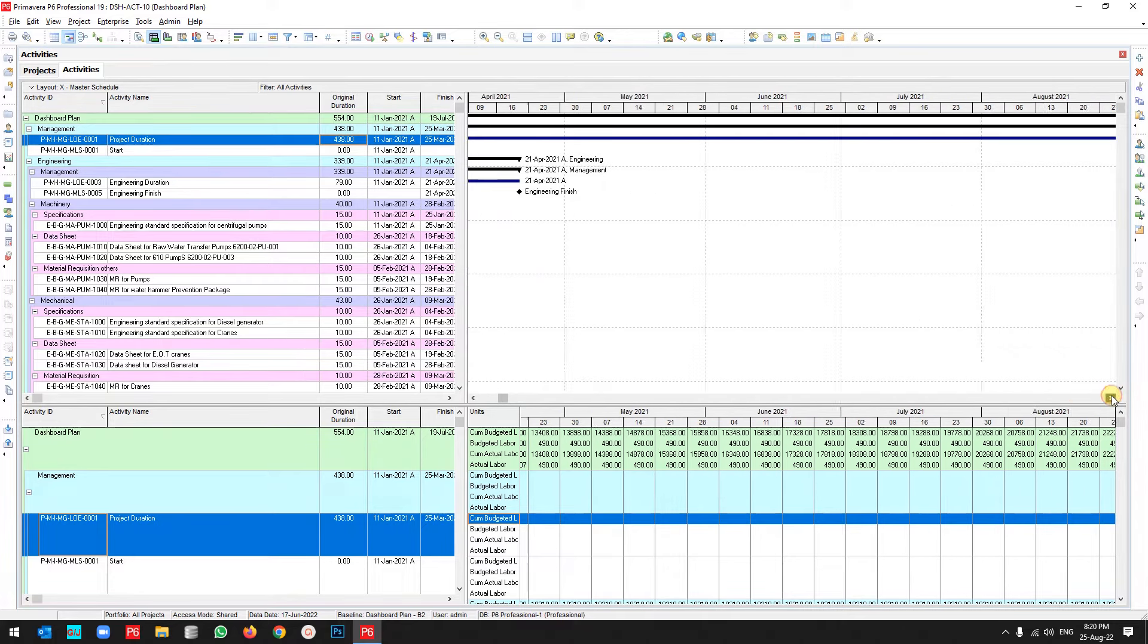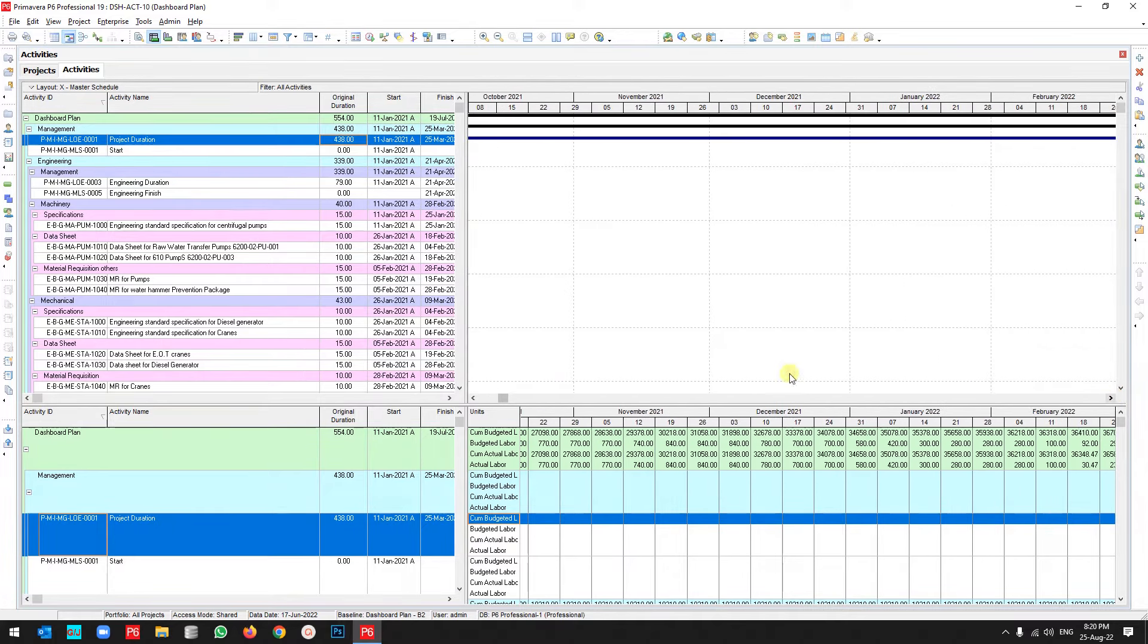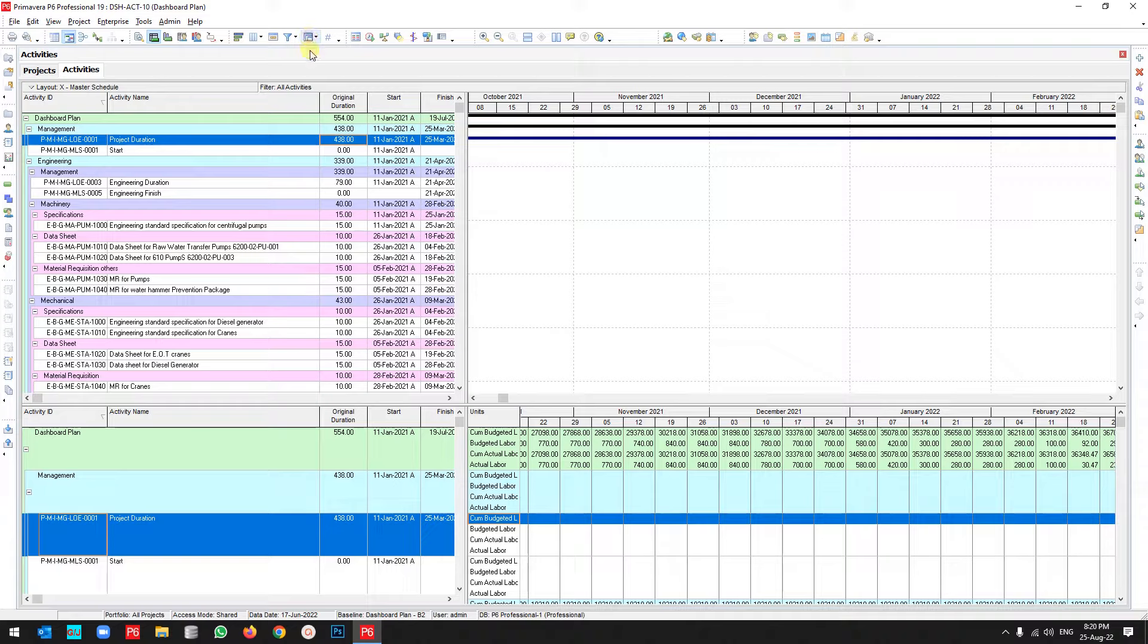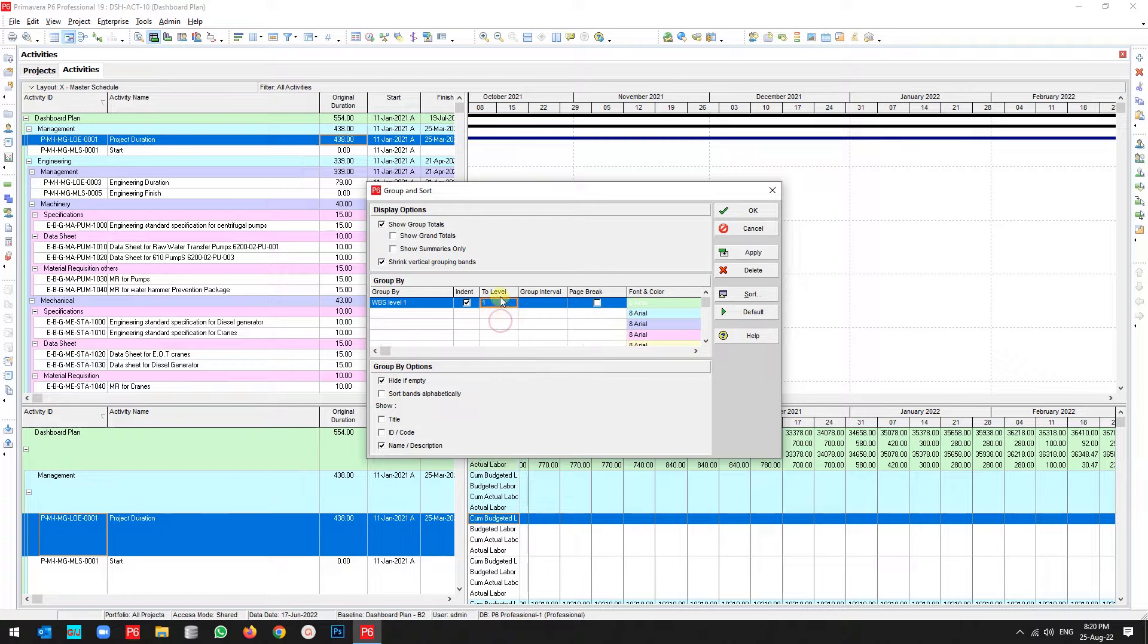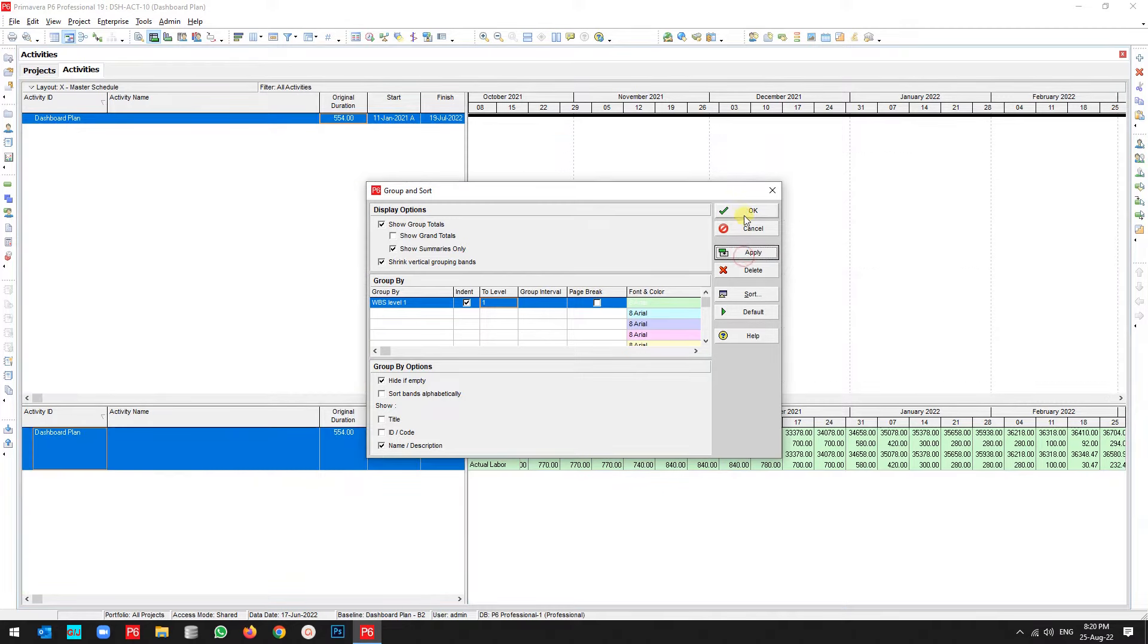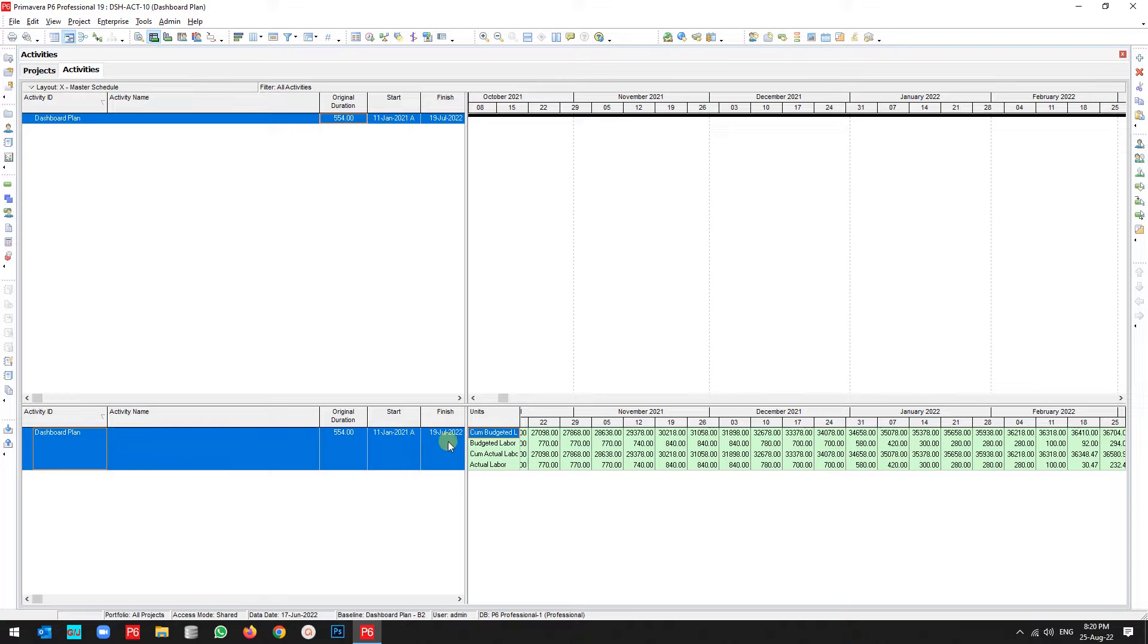But as you see, my project is a little bit big, so let me create this curve for some part of them. I go to the Group and Sort, then filter for all level, limit it to the first level, and show summarize only. Do not forget these two steps, then apply it. As you see, all the detail data is taken off. I only want to look at this data.